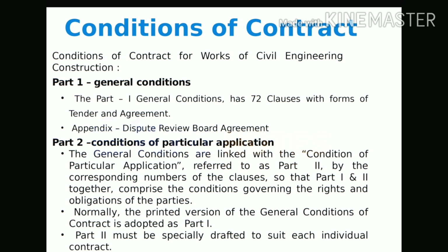The valuation of variations is based on the change orders issued in writing by the owner. Generally, for individual items of work, the variations should not be more than 25%, and the variation in total cost should not exceed 10%.